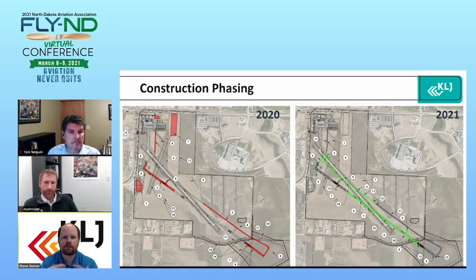And just looking at, from the consultant side, we were just kind of informed and working with the FAA and the tribes, coming up with different cost estimates. But really for the FAA and for Sherry to coordinate that, it was a big undertaking. So to have that happen and only for the airport to be closed for 1 year, it would have been pretty daunting. I think there would have been a lot less sleepless nights than there already were. So looking back, hindsight being 2020, I think everybody involved is pretty glad that we ended up going with the 2-year construction phase.